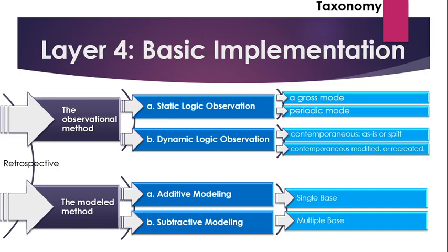A single base additive modeling method is typically called the impacted as-planned. Similarly, the single simulation subtractive method is called the collapse as-built. The multi-base additive simulation variation is often called the window analysis.